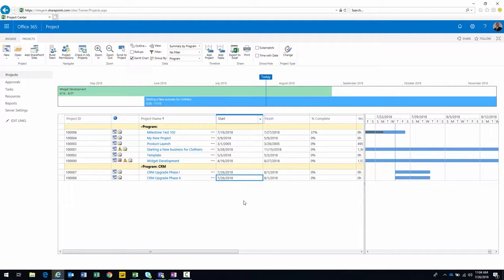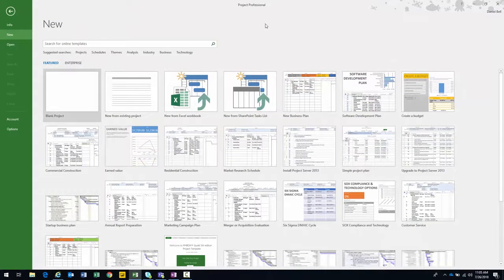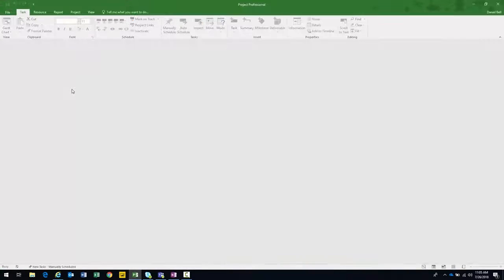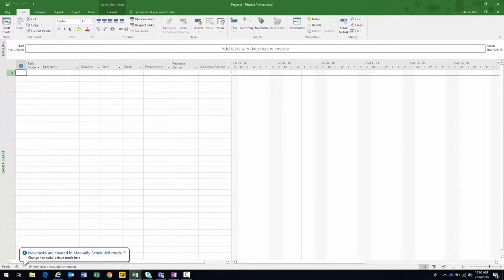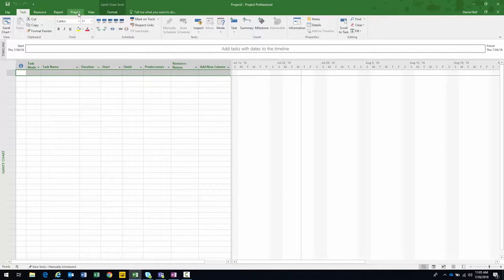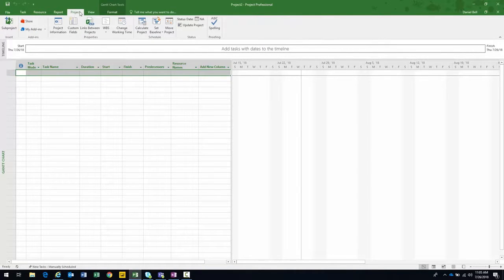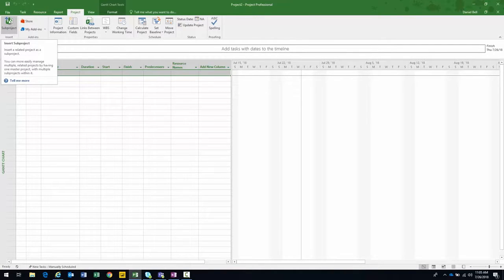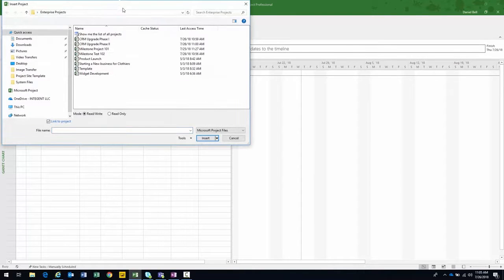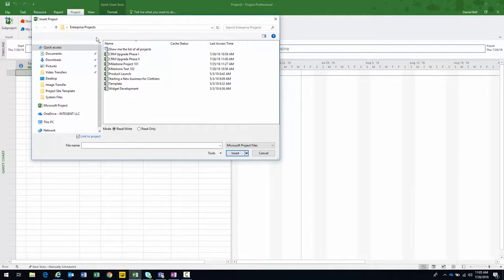As I'll demonstrate, we'll use a temporary shell master project to view the overall project schedule in Project Pro. Let's go ahead and launch. With Project Pro open, the first thing I do is open a blank project. Then I navigate to the Project ribbon and notice the Sub Project button on the far left. I click on that, and it brings up the standard Open Project dialogue — there's my CRM Upgrade Phase One.